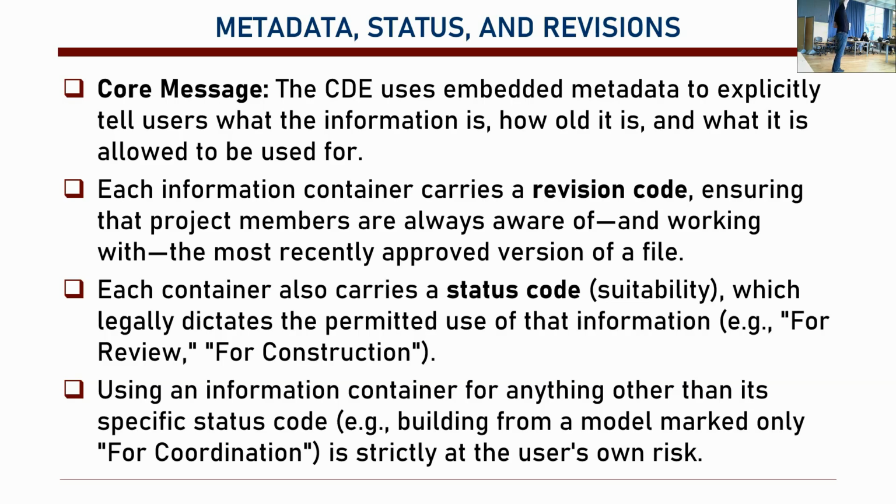That projector is just a simple box. It doesn't have any electricity connectivity in the model. It doesn't have any real details. Maybe real details will show the cables for this one are coming from the back. Maybe the actual projector has cables coming from the top. So you cannot rely on this model, but you can rely on it for coordination.